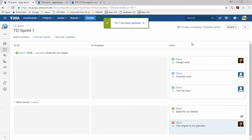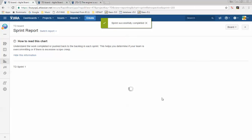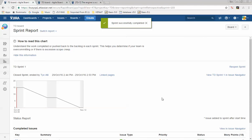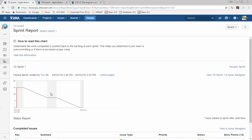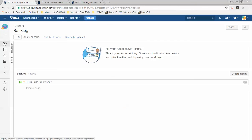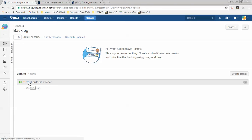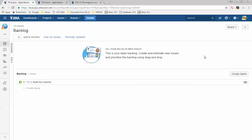Once everything looks good, press Complete to close the sprint. This shows your burndown chart — mostly relevant for the scrum master. Check the backlog — it's now simpler. The first two stories are gone since we finished them. Only one story remains. Since agile is iterative, we create a new sprint, plan the story, move it in, work on it, close the sprint, and repeat until all backlog items are complete.